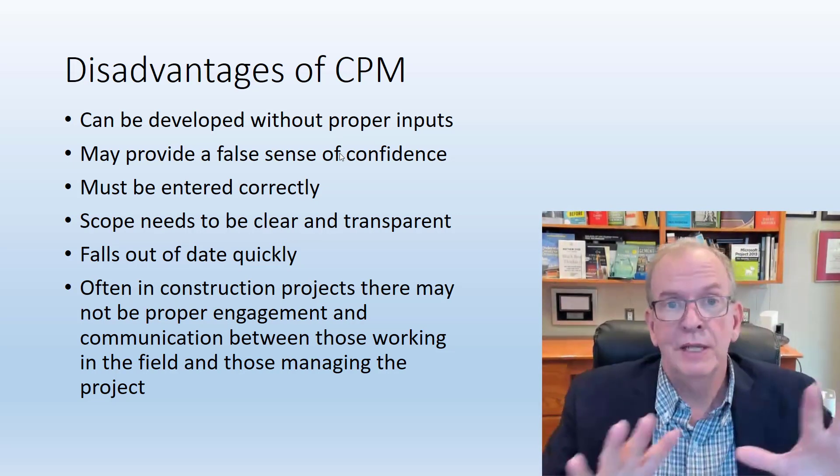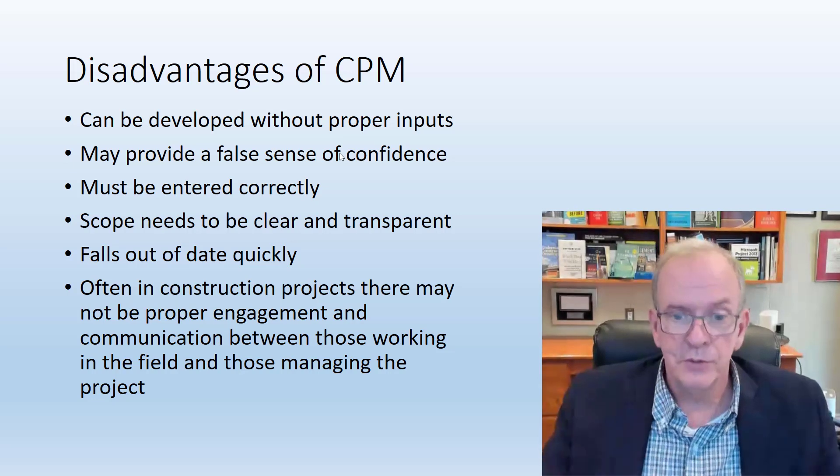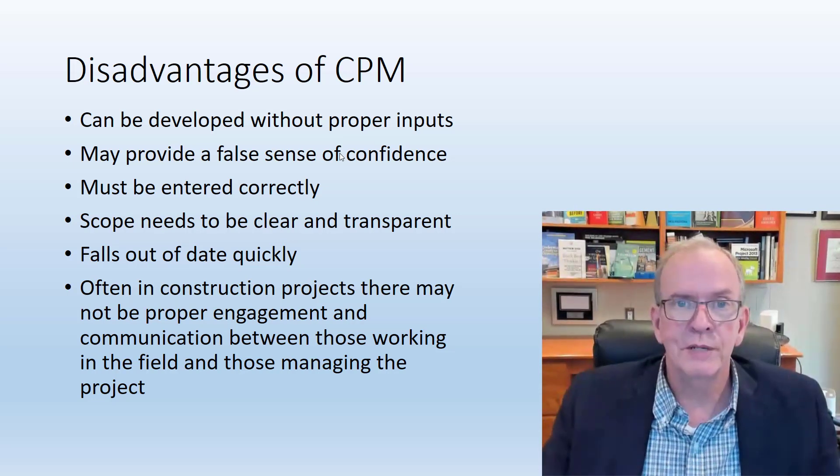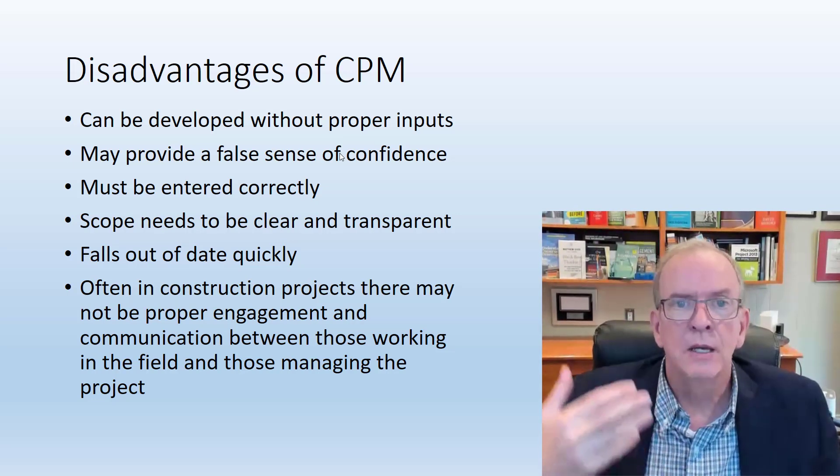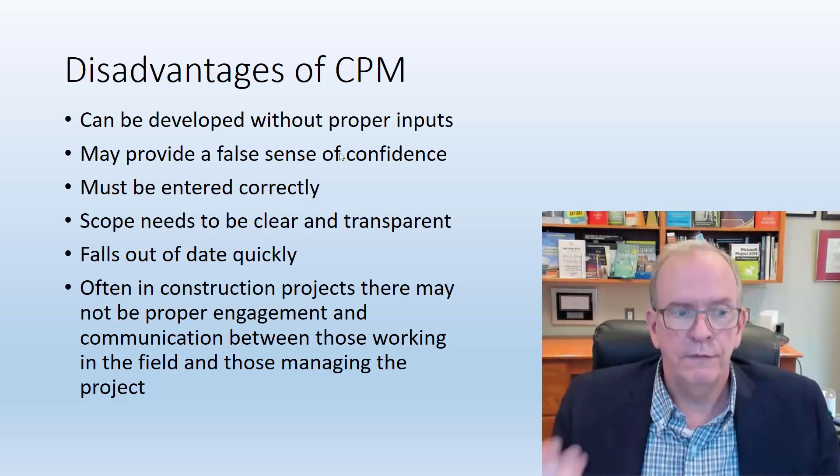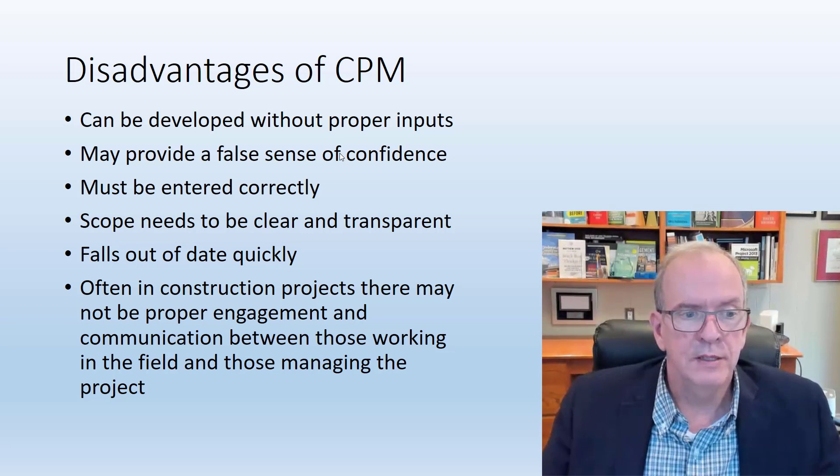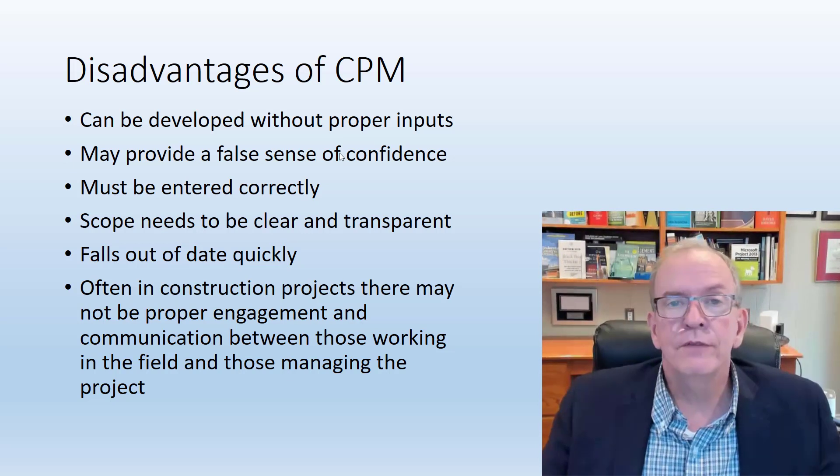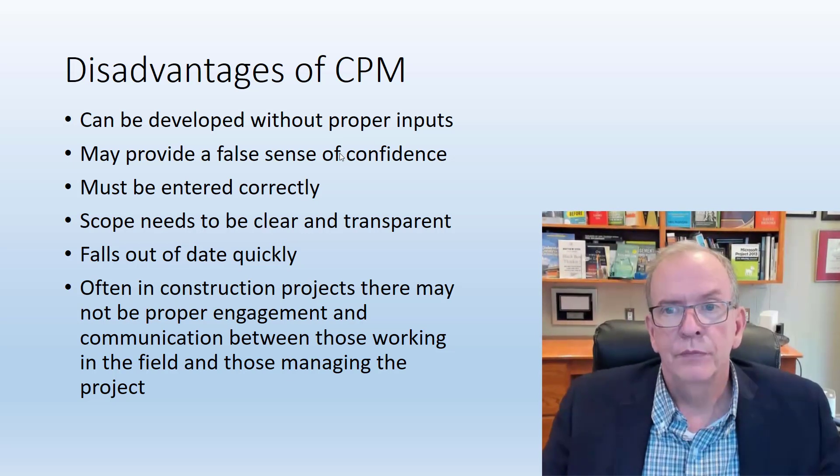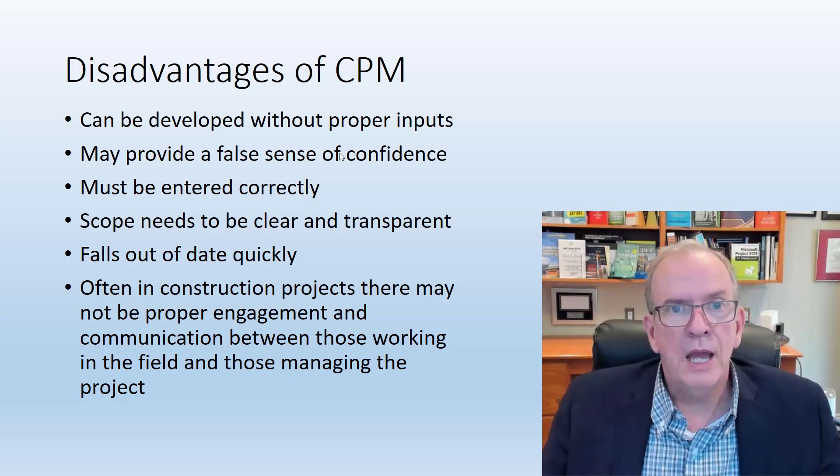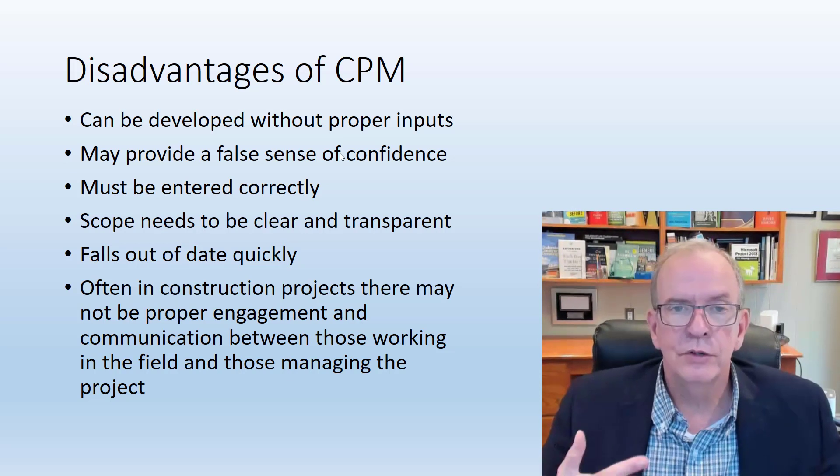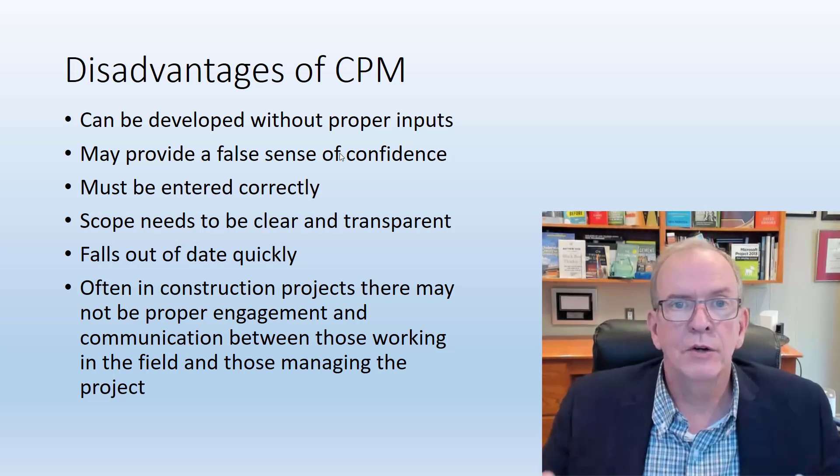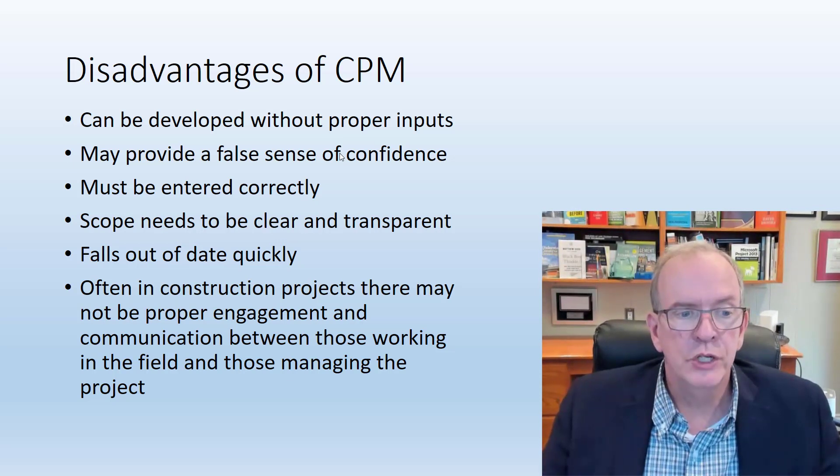The good thing is though, if you've been keeping a good schedule, you can show those impacts and then you can seek relief in those cases. Falls out of date quickly, needs to be updated on a very regular basis. Otherwise you're not looking at the current information.